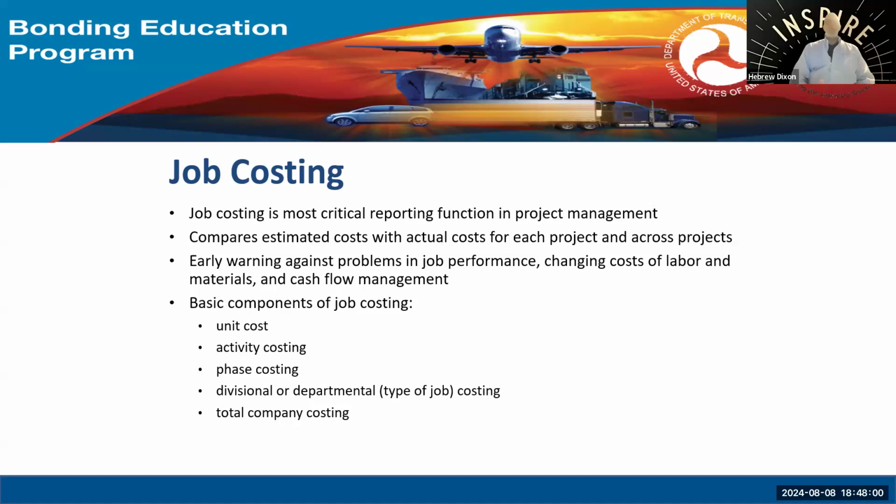What I'm trying to share with you is that most people look at monthly cost report cadences, right? You got to do a monthly cost report. If you got smaller projects, by the end of that month, you lost money. That's the whole point. I want to get this urgency in your spirit that you don't want to lose money, right? No one wants to lose money. So you want to make sure that you manage the costs as frequently as you spend that money.